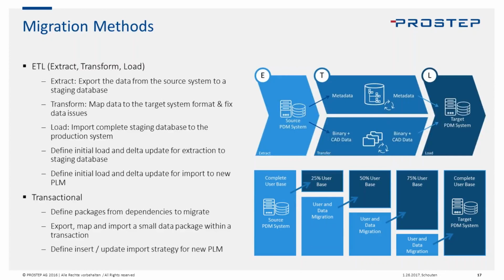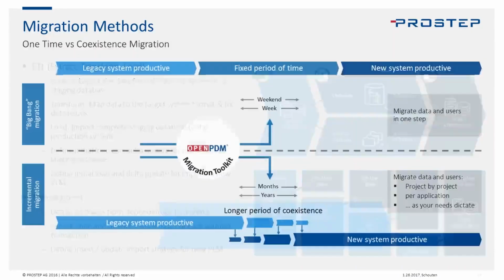And this could be one way, meaning I want to move users and not bring over data and just lock the data in the source system. You could also do it two-way, meaning that you can move the data into the target system, but then change ownership to the target system when it needs to be, and then synchronize stuff that's owned in the target system back to the source. And that would be what we call a coexistence type scenario.